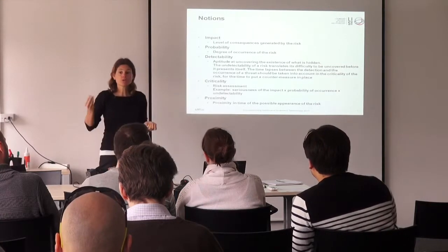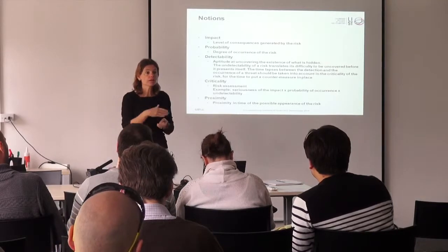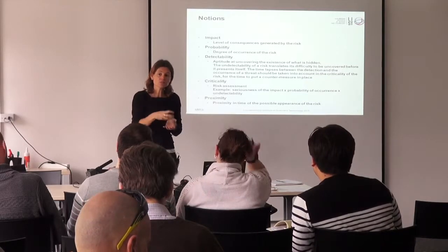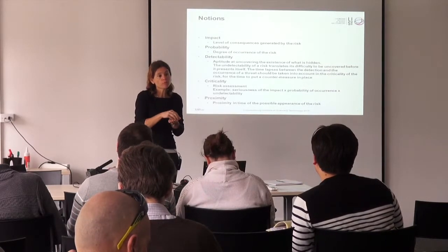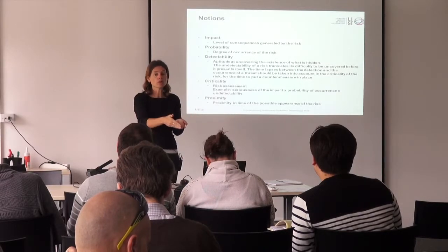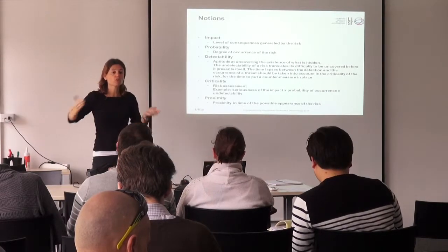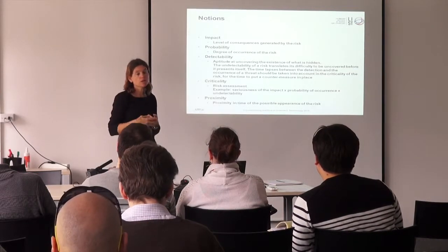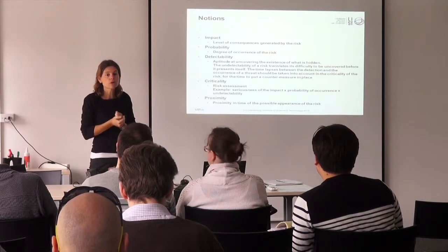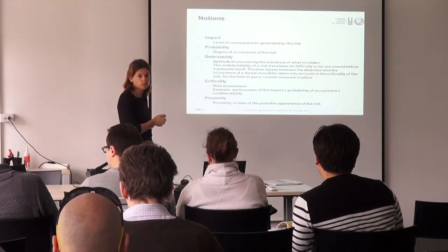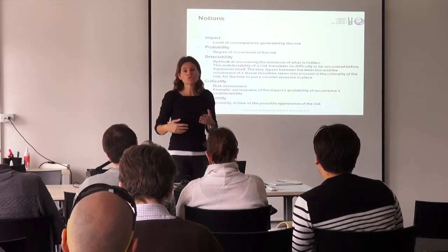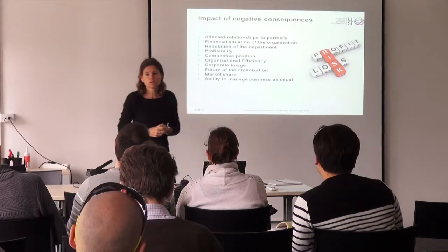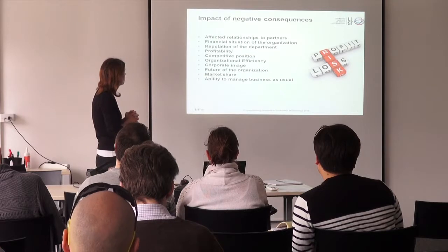But then the notion of proximity is saying, okay, over my 10-month project, the risk that this will happen is it will happen more in the next 3 months, or in the last month of the project, or in the middle of the project. So trying to identify when that risk is likely to happen. So that's the notion of proximity. And so you can try to assess your risk using all these notions, but we'll see that in practice you don't use all of them.